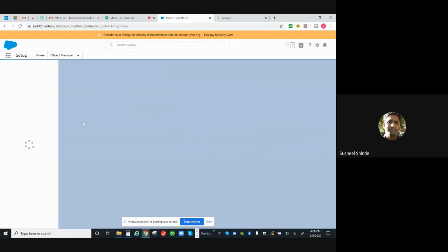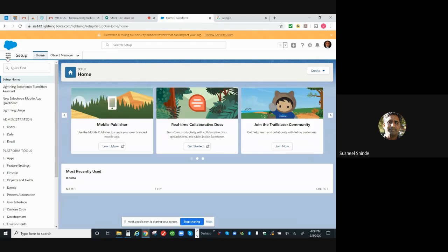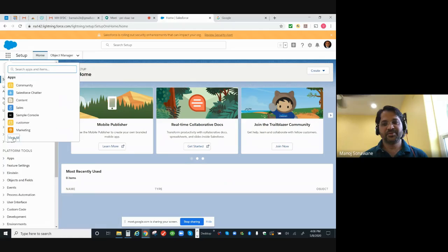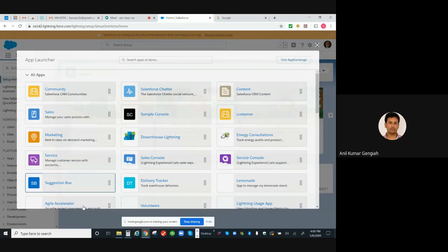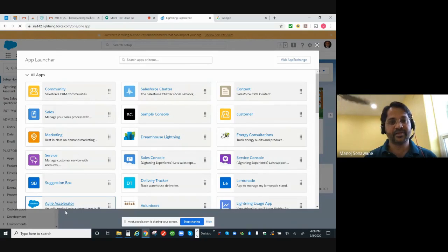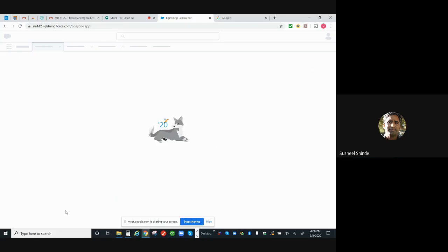This is the question where suddenly someone else adds something, whether it should be good practice or whether it can be added or not. There's no thumb rule to not do that. It's completely on the Scrum Master. If they have a buffer, that's good, they can utilize it. If they don't, then they have to balance the estimates so that they can meet the sprint. Anytime you add something, it will affect the whole sprint, so you have to watch for that.